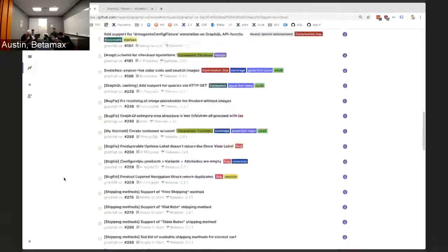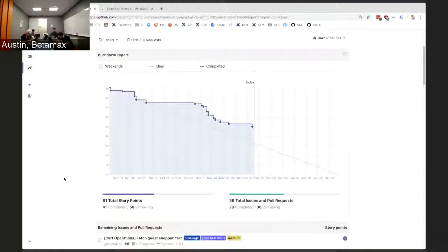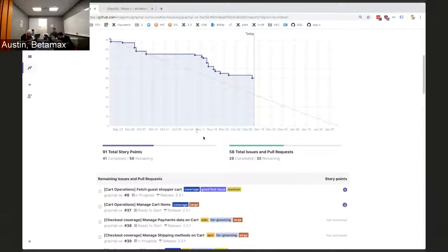From here, again, this may not be 100% accurate, and as you see on the burndown chart, what it tells us is, given the dates that we're currently guessing and given the scope that we currently have here, we've got a little bit more than technically we should be able to handle, right? And because of that, we've been postponing some of these issues that are currently assigned to this release, or assigning them to the next subsequent release, that one being 232.